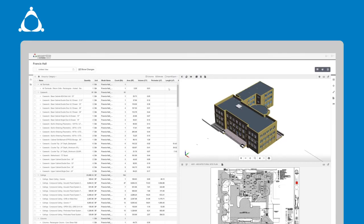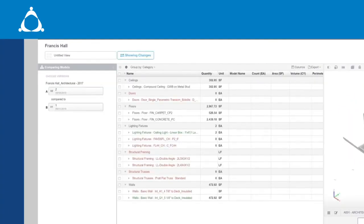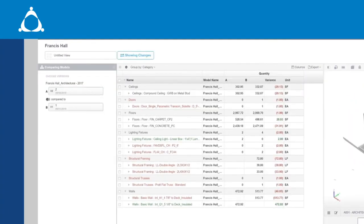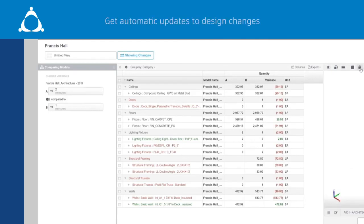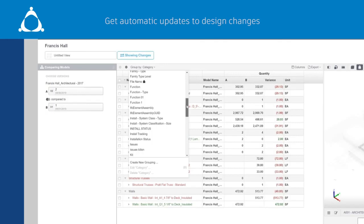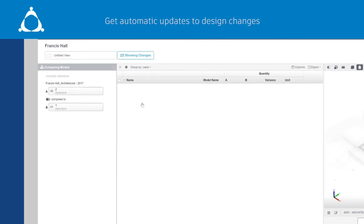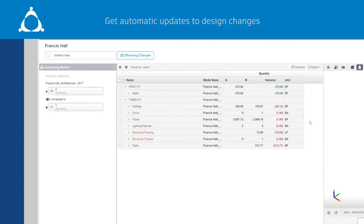As with everything in construction, changes to project design, scope, or timeline are happening constantly. Needing to stay up to date with design changes to ensure accurate estimates means that you need to go back and redo quantifying work every time the model changes.